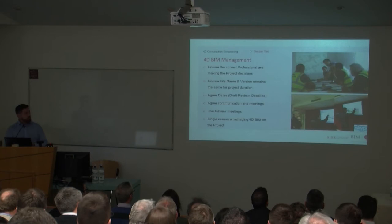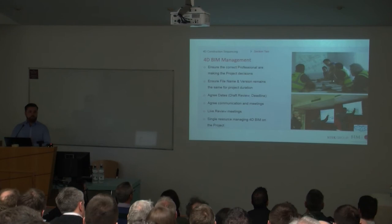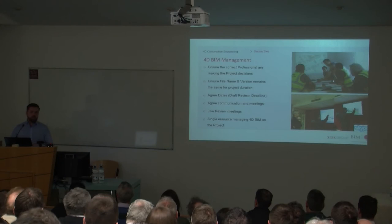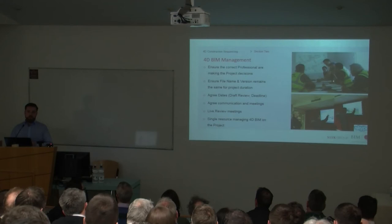As you can see there, it's an open conversation that you'd have on a project. And again, as I was saying, ensure the correct professionals are making the project decisions. So you have your contracts manager saying, I want the site compound set up in this corner, site boundary, I want traffic management coming in. And then your senior engineer saying, well, it's best we start the bulk excavation this way so we can start building a road as we're working our way out. You're making these decisions with your project team, and it's not left to either a BIM engineer or a BIM coordinator on site, who shouldn't really be taking on these decisions.